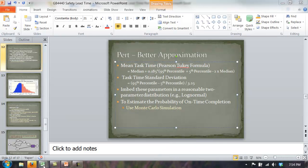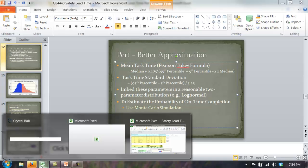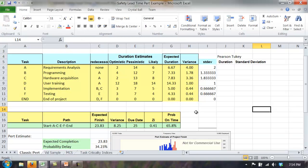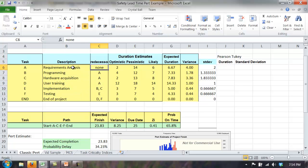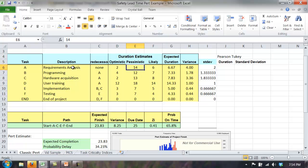Here's our sample problem from the last video. We have the same six tasks: requirements, analysis, programming, hardware acquisition, user training, implementation, and testing, embedded in the same precedence network. We have the data from the subject matter experts — optimistic, pessimistic, and most likely. But now, rather than using them in the classic PERT formula — optimistic plus pessimistic plus four times the most likely — we're going to embed them in the Pearson-Tuckey formula.